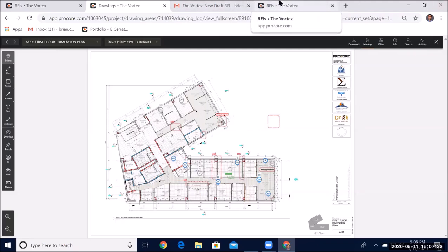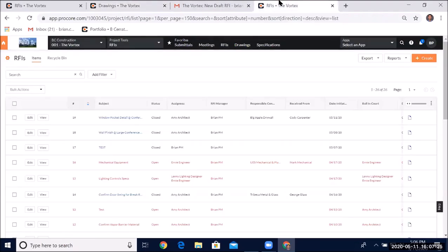Hey, this is Kendrick, guys. This is more of a general note. When you guys are asking questions on the RFIs, always make sure we're also providing an answer. Sometimes that's one or two options. So don't just ask the question and leave it at that. Do what we do, give them options. Usually you want to lead them to the answer that makes the most sense, and you guys in the field have a better answer than an architect does sitting in their office. So always give them the answer.